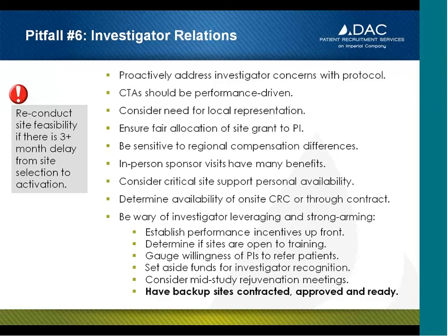As I think over my clinical trial career, I've experienced surprises during several of my past studies, with investigators going on a 3-month sabbatical, for example, or a 1-month vacation during a very crucial time in the study. Have a backup plan available, which includes, number 1, sub-investigators for all selected PIs. You'd be surprised how many sponsors still refuse to get a sub-investigator involved on trials. And make sure that those sub-investigators can provide equivalent care to research patients should the PI become unavailable during the study conduct period.